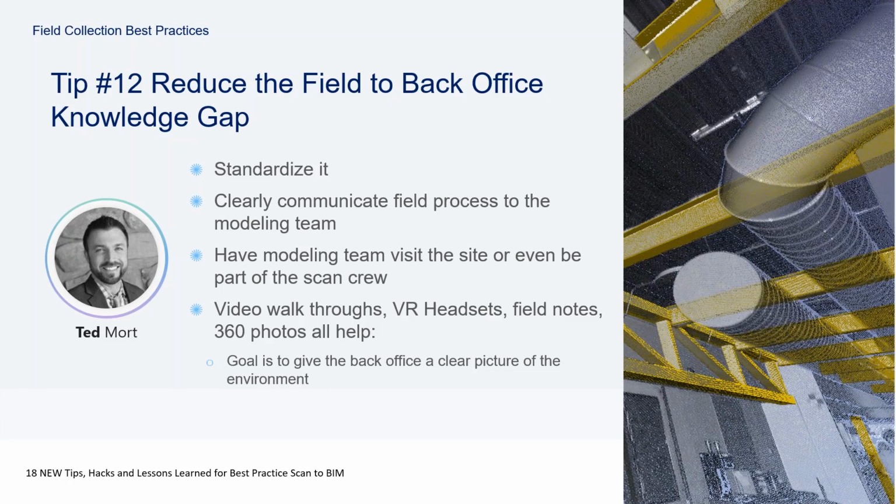So the knowledge gap is a real deal that happens when you start to grow and you develop teams that specialize in different elements of the reality capture. So as we experience this growth, we could no longer have that same person scan and then come in and model. So we learned a hard lesson that it's not easy to read minds, and we developed a couple processes that were successful in standardizing note-taking. In fact, we've gone as far as to do that all through tablets now, so that we're promoting clarity in the notes.